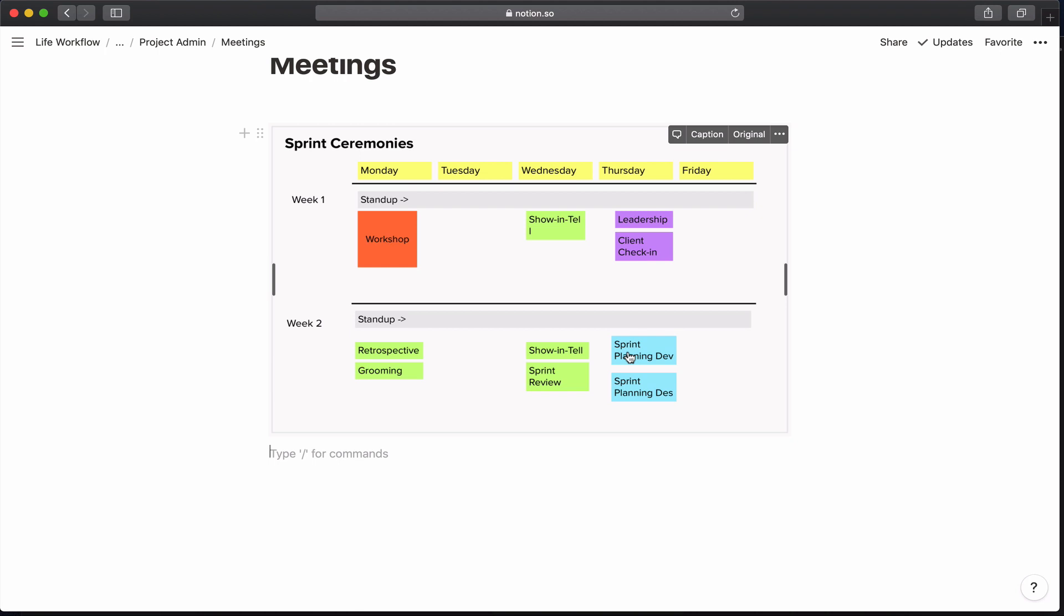And then we've split the sprint planning between dev and design. So if we're doing what we should be doing in the grooming meeting, which is letting everybody know what the task is about and making sure those tickets are fully groomed, and if we've been doing our show and tells properly so that everybody's seeing what's coming down the pike, then we don't actually need to have this full meeting with everybody and take up everybody's time. These sprint planning meetings can go very long if you try to do both the dev team and design and content teams together. So I've made that split here between dev and then this is actually design and content. And then there's a workshop that the project manager, the BA, all the design and content folks, and a lead developer attend. And that's a longer meeting, a four-hour meeting, which helps to set up what it is that we're actually going to be designing to build out.